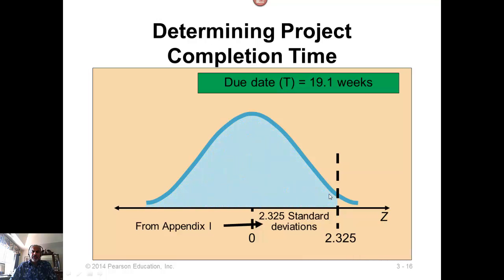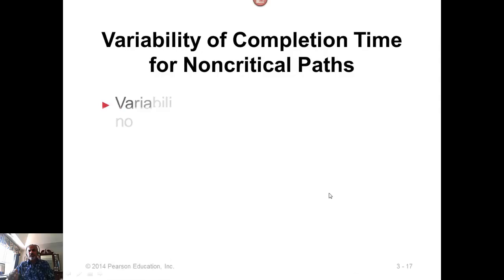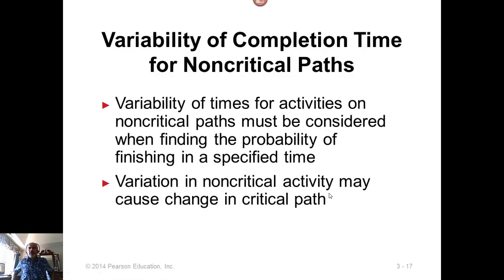One more thing we should keep in mind, that if the second longest path, which is not a critical path, but if the second longest path has a higher variance than the critical path, then the probabilities of the second longest path will be very important. You have to compute probabilities for the second longest path also. You do that only if the second longest path has a larger variance or larger standard deviation than the critical path.